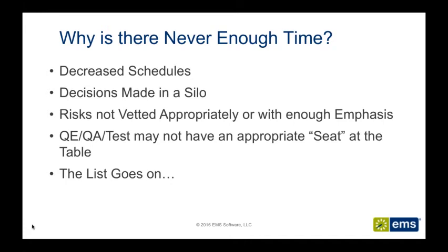Things tend to flow downhill to the testing team, so if dev, design, or architecture estimates to the left of us were somehow inaccurate and those original estimates increased, without a release date shift, the time that we had originally wanted to schedule for testing tends to be decreased by that.